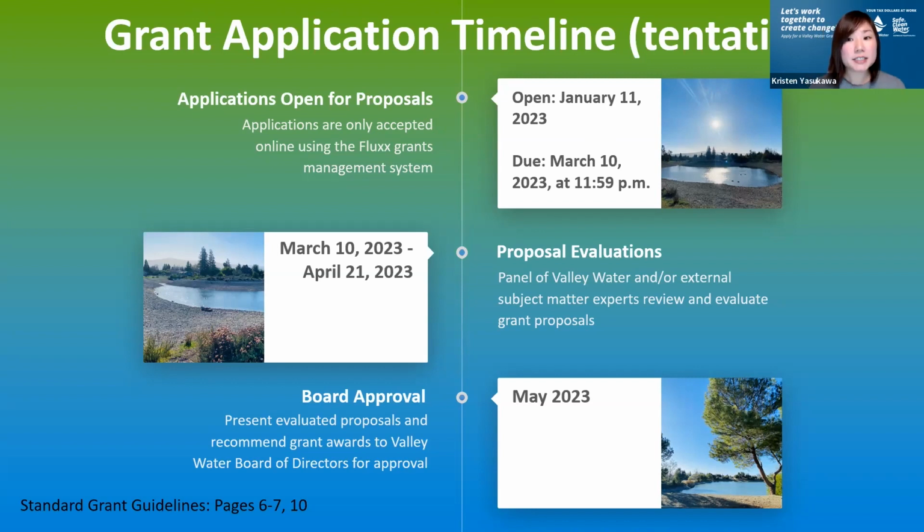Yeah, so that's a really good question. Like I mentioned, last year, of the applications that were awarded into grants, none of them got 100% funding. So after that, we did have to work with all of those awarded grantees to reduce their scope, schedule, and budget to the amount that they were awarded. So yes, we did have to do some revisions after the award.